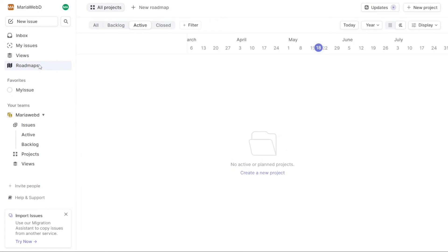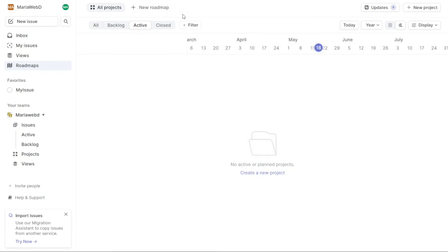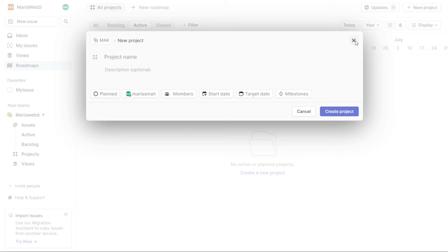The Roadmaps tab in Linear displays a timeline of all the projects in your company's workspace. It adds a high-level structure that organizes projects and helps you make decisions and plan as you see projects and their expected completion dates on the timeline. Custom roadmaps can also be created to organize work in a single team or across your workspace. All members of a workspace can view roadmaps, meaning your company's vision and direction are accessible to everyone at all times.